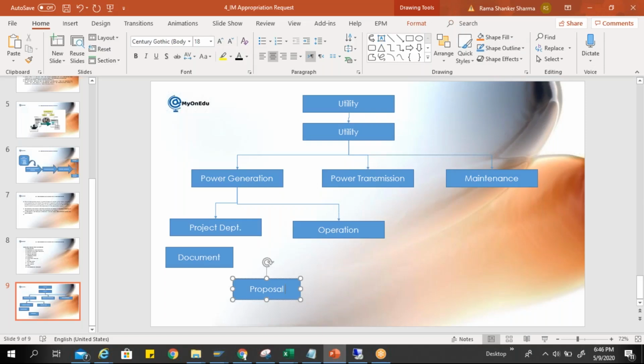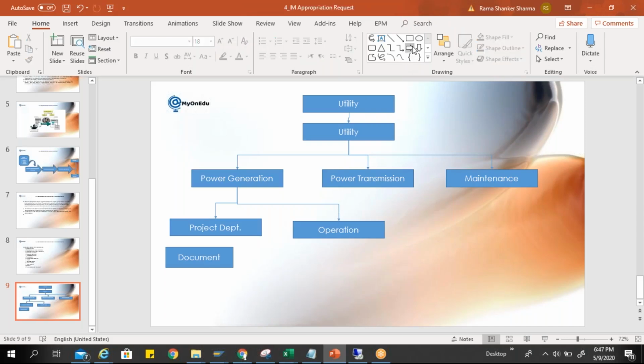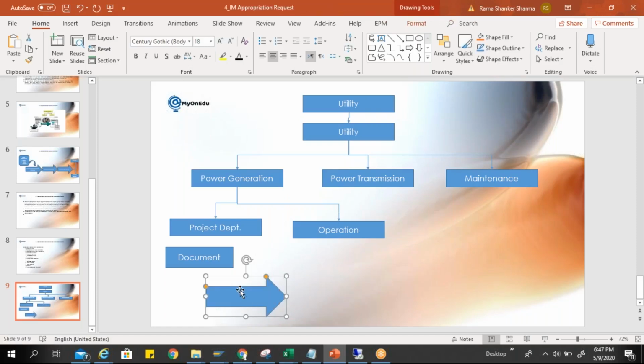In SAP investment management, you have one object by which you can manage this requirement. Based on the document you get from the strategy department, you can create an appropriation request in the system where you can enter all the data. Let us consider what this appropriation request will do exactly. Let's understand it this way: this is your proposal submission.